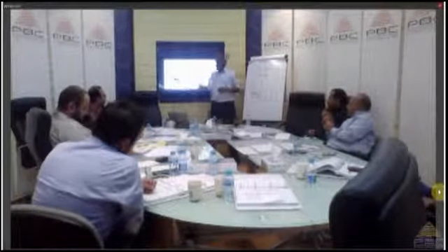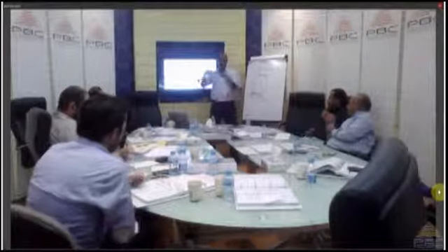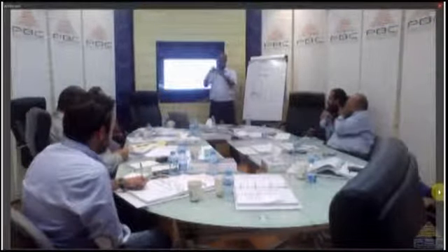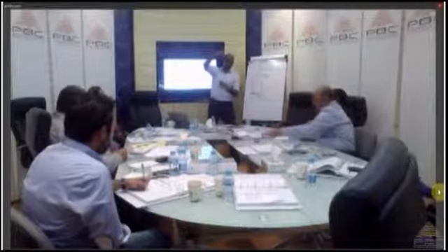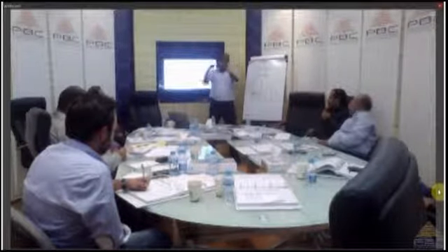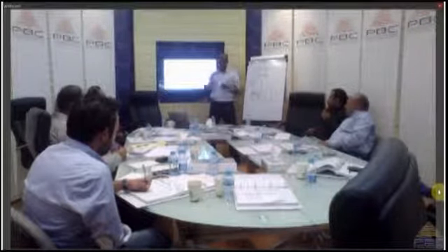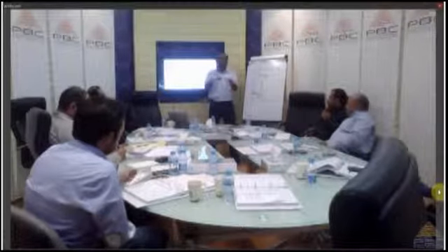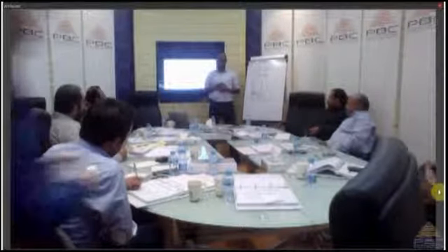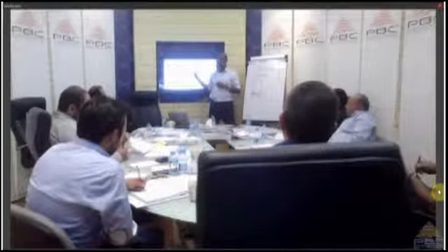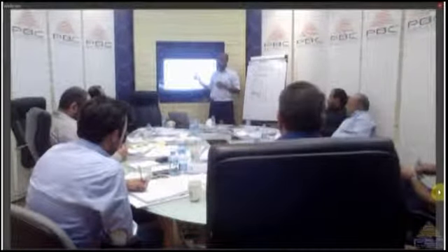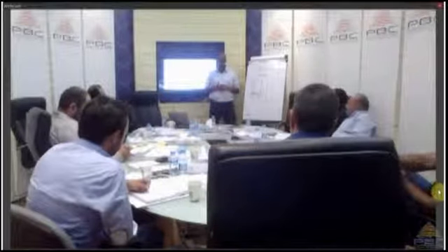To the functional managers. So any clash between a functional manager and a project manager, functional manager wins. If they both have the same amount of power and authority, we call it a balanced matrix.